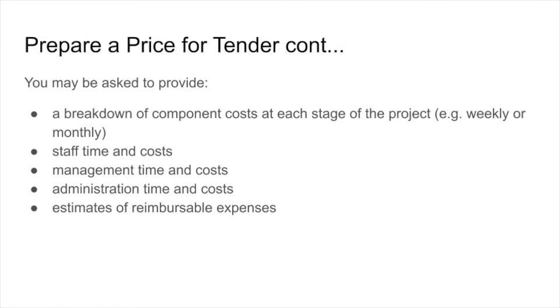So it's $15,000 worth of work you're going to do. You're not going to get paid. You need to consider, what are my expenses in that in terms of interest and the like. And a lot of companies will wait a while to get paid. So you need to factor that into the price of your tender.